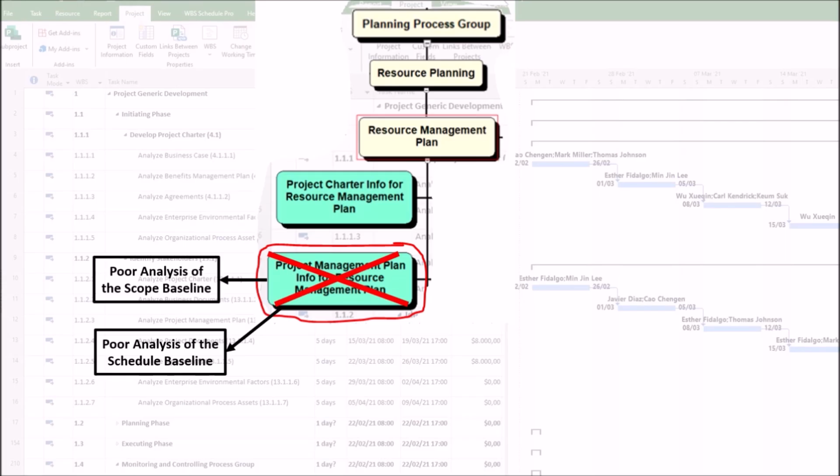Second, costly idle time. Conversely, resources might be procured and hired too early because their start date wasn't tied to a precise predecessor task, leading to them sitting idle and burning through the budget. Third, unrealistic timelines. The resource plan might assume a normal 40-hour workweek, but a compressed project schedule analyzed too late reveals the need for massive overtime or a larger team, which is now impossible to acquire in time.